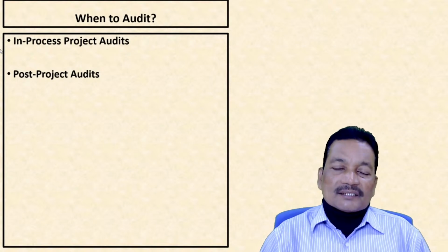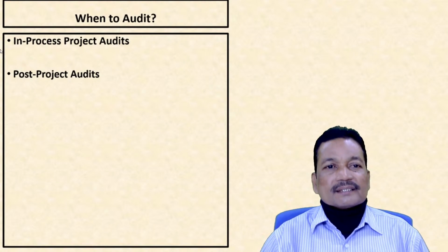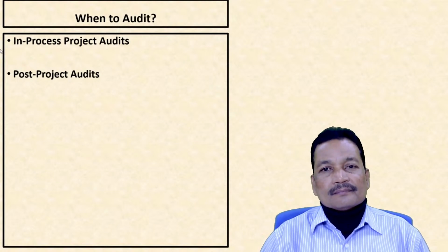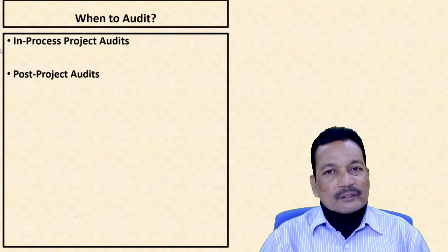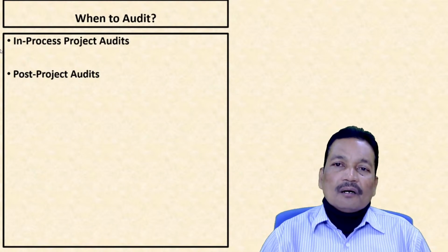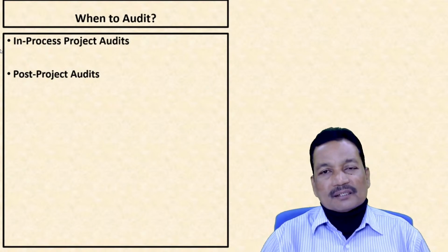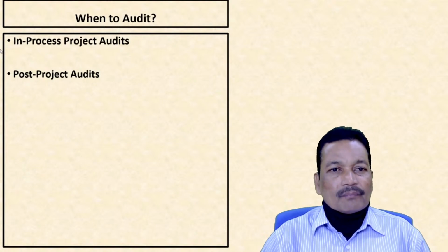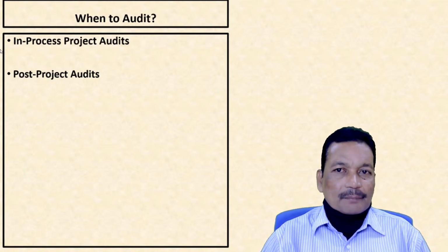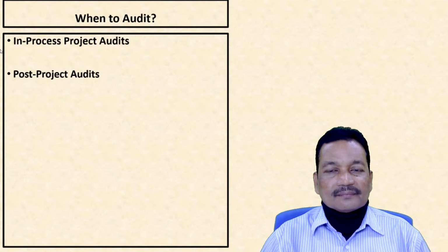That means as the implementation stage is going on, or the progress of the activities in a project is going on, we pick up or do the audits at regular time intervals to see whether the activities, till the point of time when the audits are being carried out, are meeting the set standards.